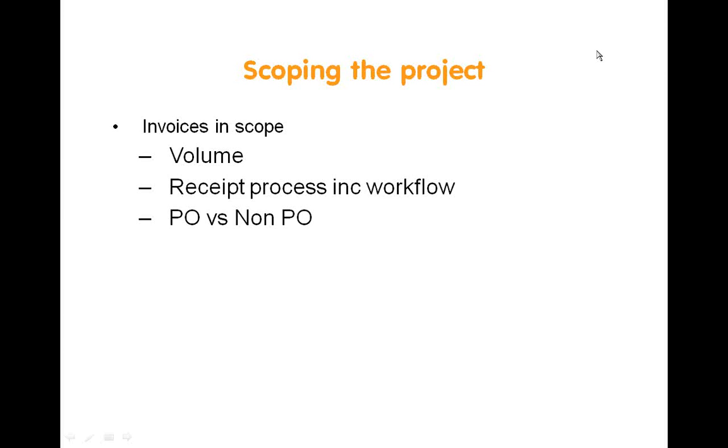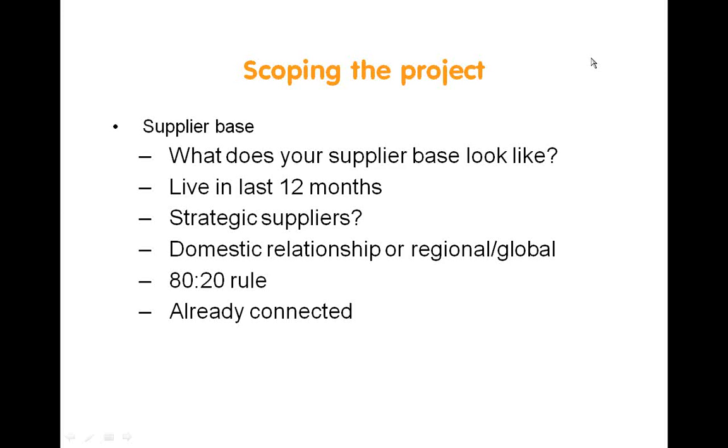So moving on, in terms of scoping the project, again, what does the supply base look like? So become very familiar with your supply base. If you haven't cleaned it up, then do so. If you haven't consolidated it, now is the time to do so. Have a look at the live suppliers that have been trading with you in the last 12 months. Who do you have strategic relationships with? Be very aware of those. Who are your strategic suppliers? Who are your contractual suppliers?